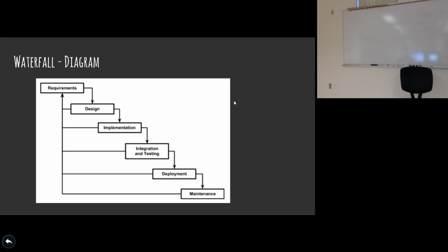So you try to fix all the bugs you can, find them and fix them before your users do, and then you get to deployment. Deployment's that process of, okay, we've got it ready to go, let's get it out to our customers. So we've got 3 months, 2 years, 2 to 5 years, maybe about 3 to 9 months, probably closer to 9 months. And then we've got this deployment process, which probably takes under a month, hopefully, to get it from finished to live. Depends on how complicated your system is.